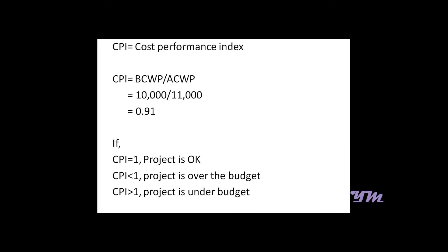We have an index known as Cost Performance Index, which is BCWP divided by ACWP, so that is 10,000 by 11,000, which comes out to be 0.91. If CPI equals 1, the project is OK. If it's less than 1, the project is over budget. If CPI is greater than 1, it is under budget. So in this case, it is over budget.